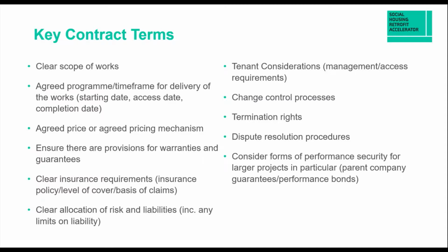Next one then, clear insurance requirements. So what insurance is required? So what insurances does the contractor have to have? What is the level of cover that he has to have? And what is the basis of any claims? Is it in the aggregate or each and every?